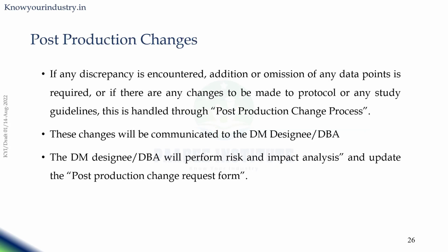If any discrepancy is encountered, or addition or omission of any data points is required during the ongoing process of the study, a post-production change request form comes into the picture. This we discussed in the earlier slides also. Why is a post-production change request required? Because if any modification occurs to the protocol which is going to impact the study data collection, then that has to be identified through a post-production change process, so that it is clear which particular form is impacted and which data is going to be updated or a new data is involved.